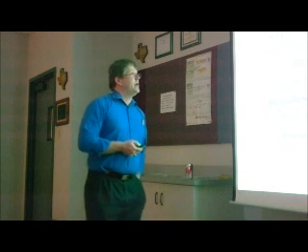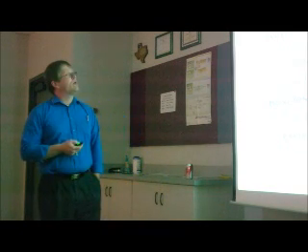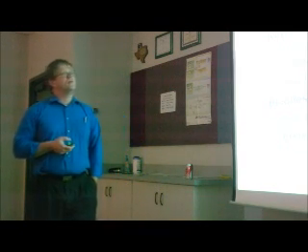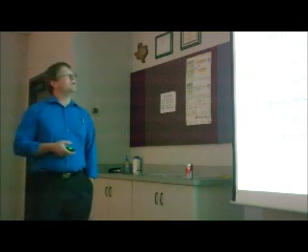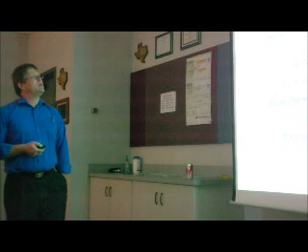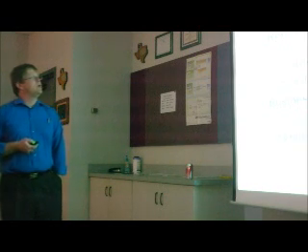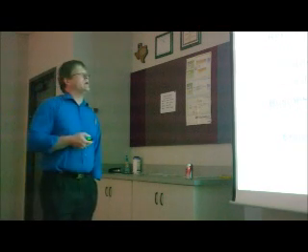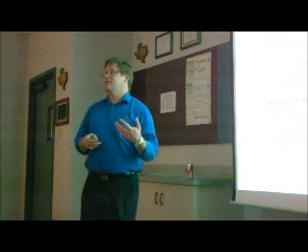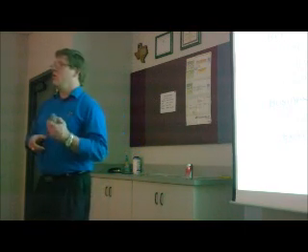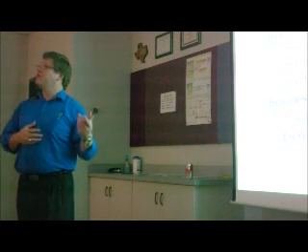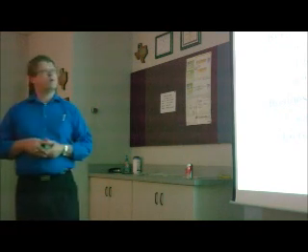So the deliverables out of this stage: a request for proposal issued to potential vendors for their reply. Hopefully you get a reply. Maybe you do, maybe you don't. You never know. It can be tied to a contract with a selected vendor. Another is a revised set of physical network diagrams. You go through this whole process, and that vendor may come back to you and say, okay, we've got a better design. So you may have to go back and revise the design that you originally came up with